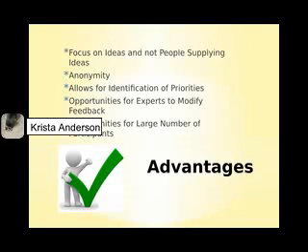The Delphi technique has several advantages. Because the collection of data from expert input is done remotely, the experts can remain anonymous, which puts the focus not on them, but on the ideas that they provide. This focus on ideas allows the project team to identify priorities or risks that may have greater impact to the project. The Delphi technique also allows for experts to continuously provide feedback and modify their input as the data collection process progresses. The ability for the tool to collect feedback from a large, diverse group of individuals is another advantage to using Delphi technique.